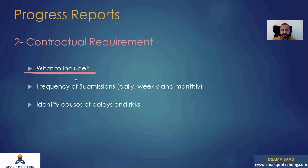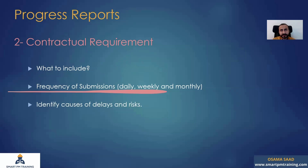It is a contractual requirement. In modern contracts, you will see the list of requirements. Maybe you will need a progress curve, KPIs, and how often you need to submit — the frequency of submissions. Do you need a daily report, weekly or bi-weekly, monthly, quarterly? In many projects, they will need daily, weekly, and monthly.